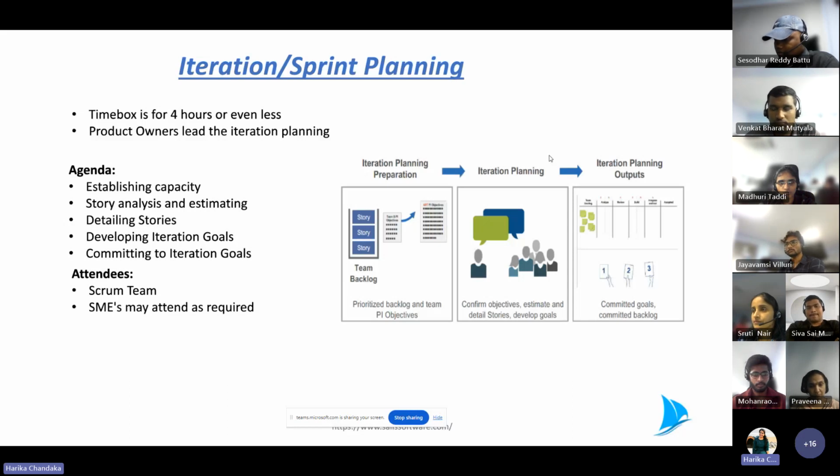We will also reach out to the QA team, the testing team, to ask how much time they would take for testing. Based on that, we give the story points. If they say they need half a day more, it's altogether 2. And we always give the story points in Fibonacci series, 1, 2, 3, 5, 8, 13, not in a line.